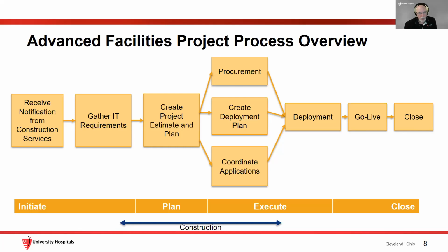We can't just leave people and say, well, you're on your own now. We make sure they understand how to use the help desk. And the help desk is aware it's a new facility. Maybe we have to have escalated priority for some of this. So having a good plan for turnover and, I can never say this word, operationalization of the facility, that's extremely important. And that's kind of the demarcation, is getting that operations piece in place, making sure that things can work going forward.